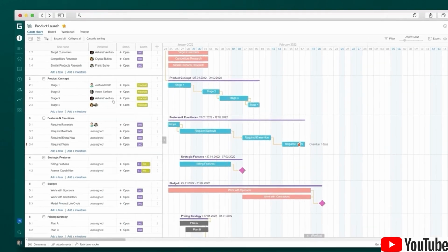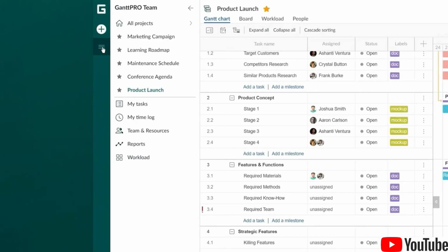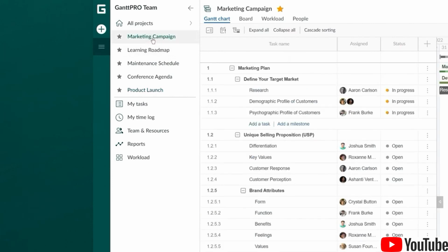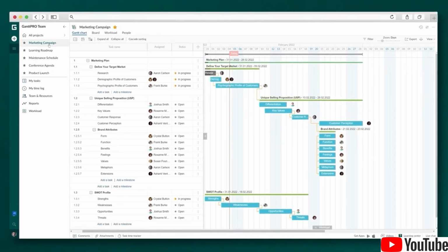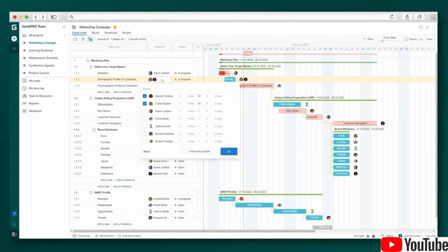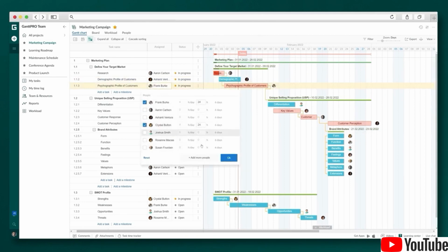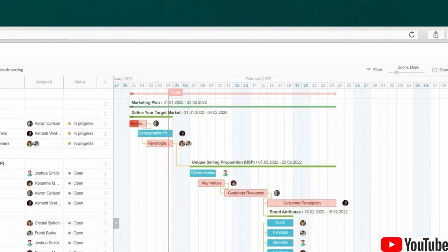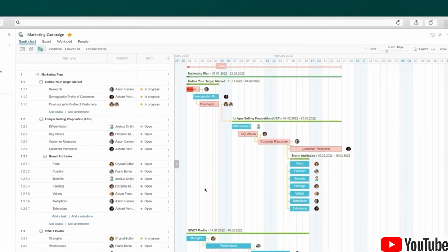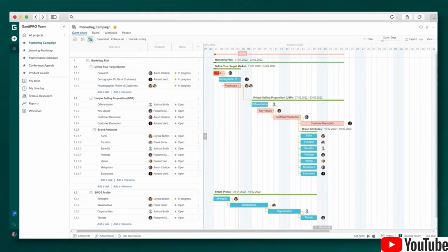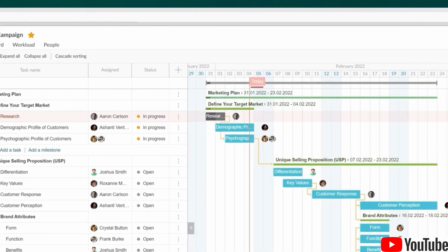Projects can consist of hundreds of tasks and dozens of dependencies between them. With GanttPRO, you can easily identify those that have a bigger impact on the duration of the entire project. To determine what tasks affect project duration and require closer monitoring, use the Critical Path feature. It allows you to highlight the key tasks on the schedule. The timely completion of such tasks affects the timely completion of the whole project. The critical path is highlighted in red on the chart. In just one click, you can quickly and easily find out about any overdue tasks. These tasks have not yet been completed, but their current date has already passed their end dates.